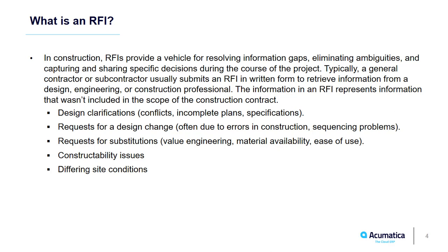So what is an RFI? On a construction project, RFIs provide a vehicle for resolving information gaps, such as design clarifications, requests for a design change, requests for substitution, constructability issues, differing site conditions. Normally, the information in an RFI represents information that wasn't included in the scope of the construction contract.